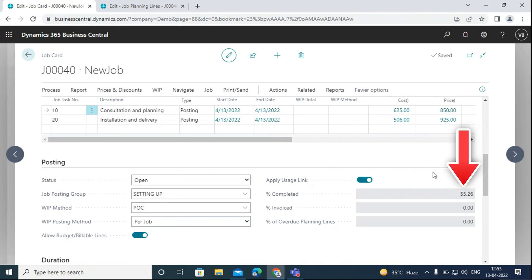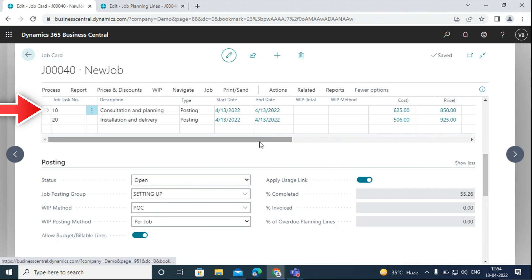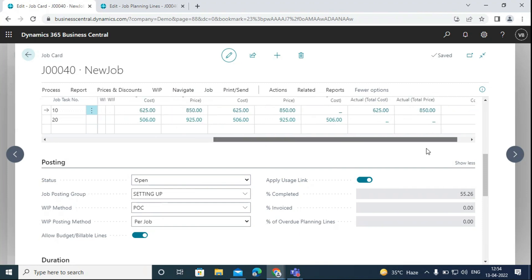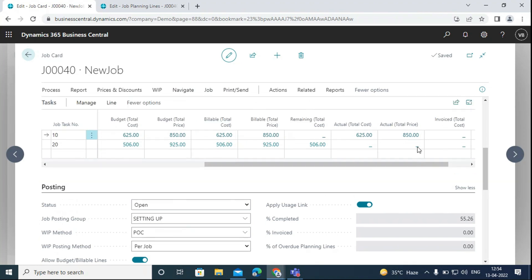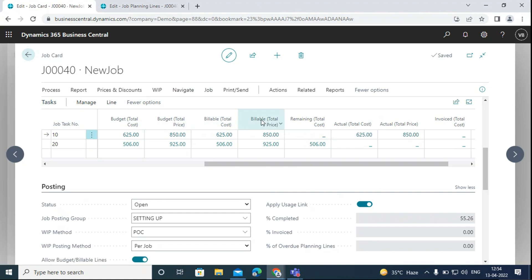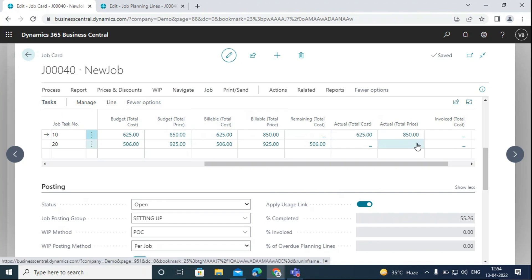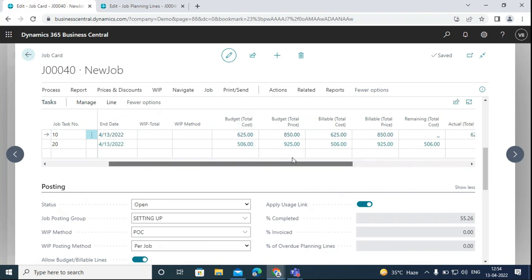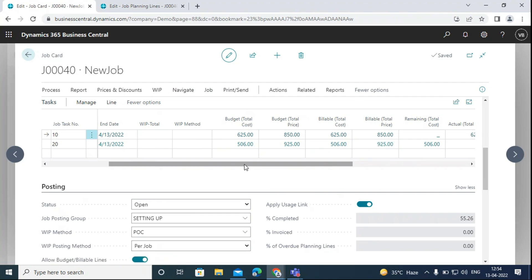Now on the job card we can see that we have completed 55% of the project, as we have completed the first task and entered the usage. The first task — consultation and planning — has been completed. We can see the remaining usage for the second task that we have not posted yet. The actual total cost for the first one that has been posted is 625 and 850, transferred from budget or billable lines. We can also invoice the customer for the amount of work completed, or when the job is fully complete.